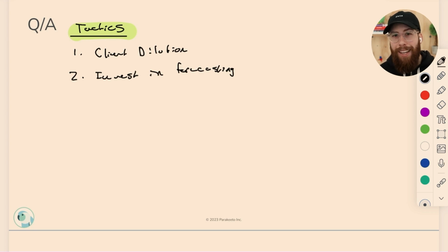But when you're trying to answer the question of what does our marketing department look like for the next 3 months, and how does that change if we do or don't close these 3 projects? Running that simulation in a bottom-up framework is going to have so much drag. It's going to be so slow. It's really hard to look at broad time horizons and start really looking out into the future. And that's where a top-down methodology becomes really important.